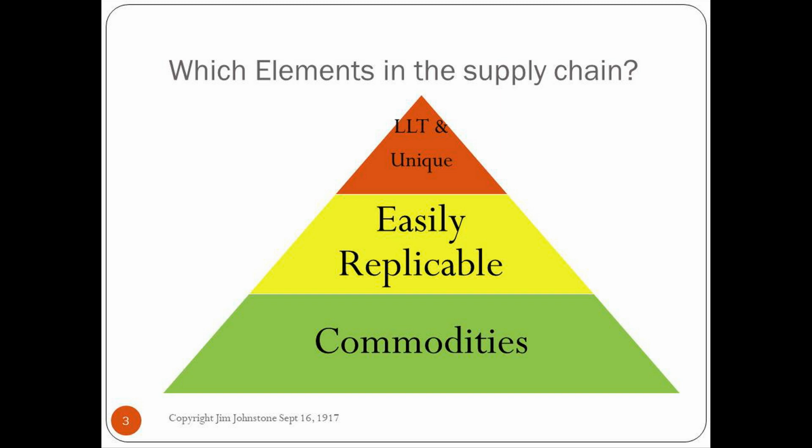Parts which are easily replaceable because there's no special technology or know-how required to manufacture them, and that have very short lead times, may be grouped into families so that you can make general assessments of the risk and have a more generic plan. And then there are parts which uniquely determine the function and features of your product, that are hard to functionally test until they're integrated into the system, or that have a very long lead time. Those are the ones we want to give more specific attention to.